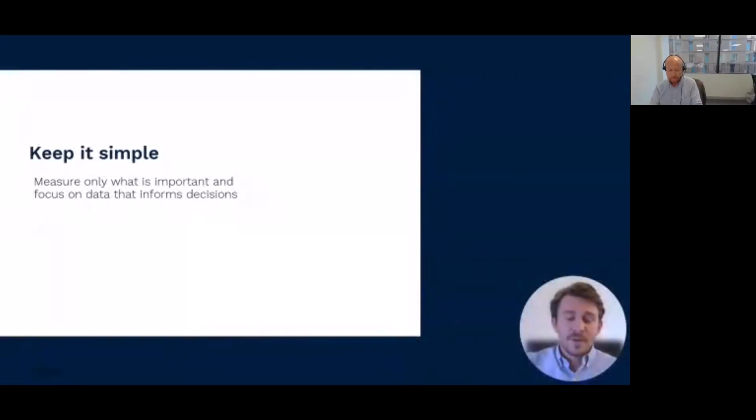That's absolutely fundamental, and all quantity surveyors should keep it in mind whenever they're tackling a benchmarking process, no matter what stage of the process they're in. Benchmarking is not about trying to collect and analyze every single piece of project information right from the beginning. The best examples of benchmarking start off measuring only a few key metrics that are really important for making decisions and getting them really dialed in. You can always add complexities later once you start to understand the variables better.